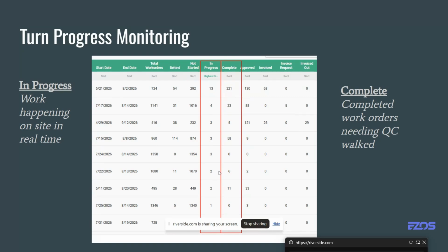What's great about this that we've mentioned in the past is the in progress number gives us something that you've never had before, which is a view on how many crews your vendors have. They can tell you they got 4, they can tell you they have 3. You can actually see those 3 or 4 crews as they're working. Another thing that I know we mentioned on our last call, but specifically for you regionals, since you guys are kind of the front lines out there, if I get into day 1, potentially day 2, and I don't have any work orders started yet by my vendors, I've got to call then.